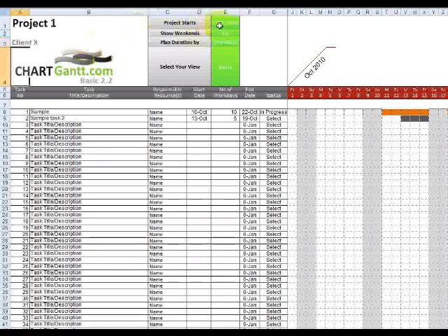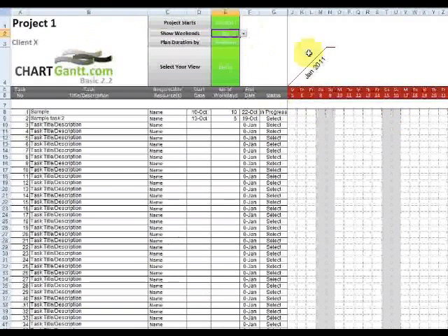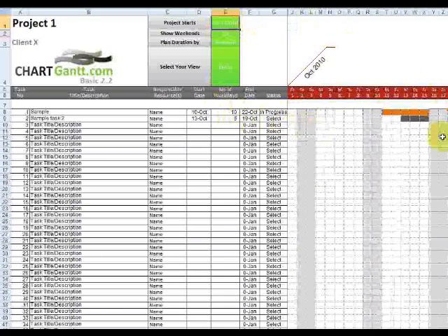Okay. Now, one of the key things we need to do is set the project start date. And what this does is it sets the date that we're viewing our information from here. So let's just move this, for argument's sake, to the 1st of the 5th, 11. Okay, and we'll see that that date range changes immediately. That information that's actually planned in that previous period doesn't disappear, it's still in the system. So if we go back to where we were, that's all still there.